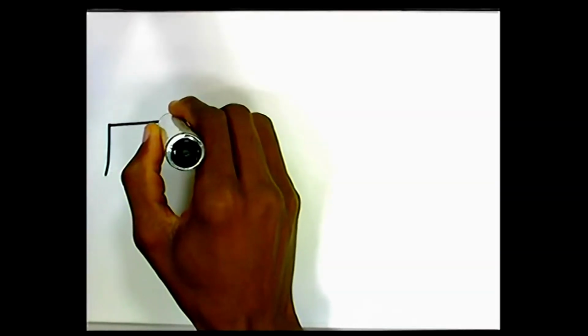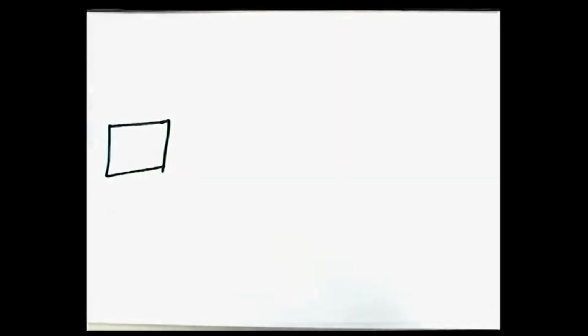So let's start with activity A. It says it has no predecessor, which means that activity A is the first activity. So I put down my first node here, kind of pretty one, and then I put in my label as A. Okay, so activity A is the first activity and has no activity coming before it, so it's going to be my first one I put there.